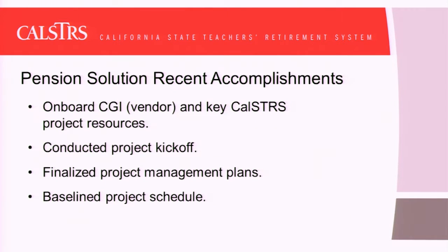We also went through a task and activity in phase 1. There were 15 key deliverables. Those were primarily our project management tools, our rules of engagement, if you will: how we're going to manage our schedule, manage our resources, deal with our issue and risk management, communication plan, decision. So it's more of the tools to help us with how we're going to really manage the effort.